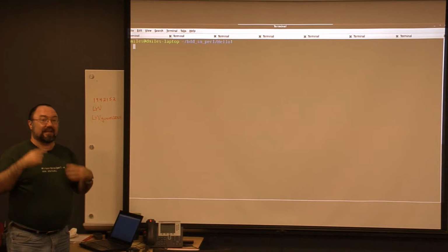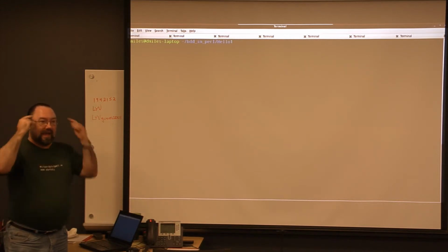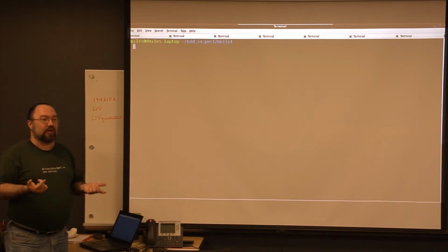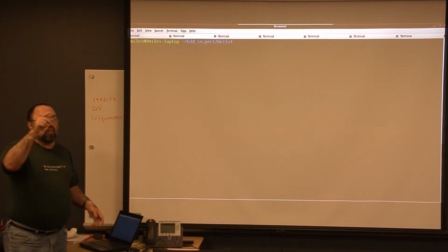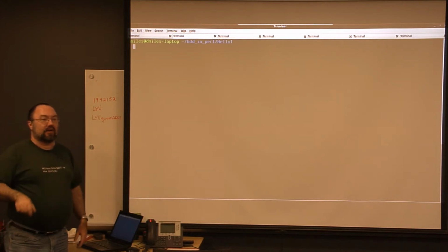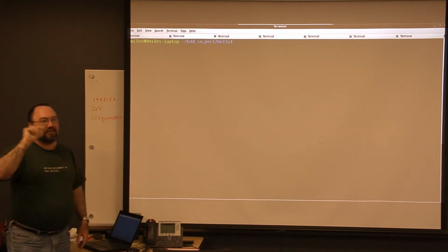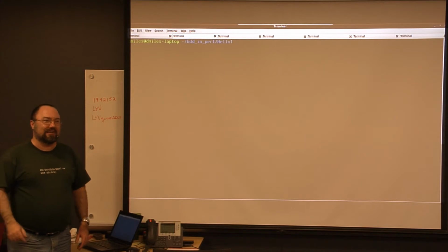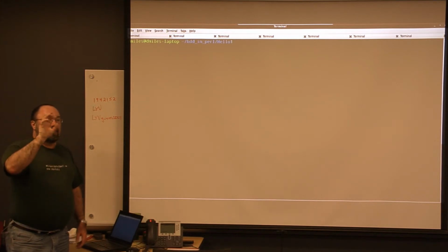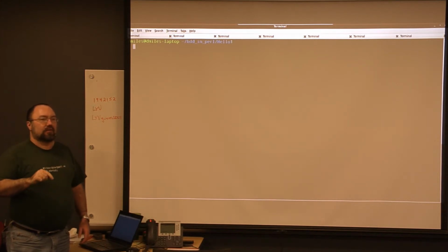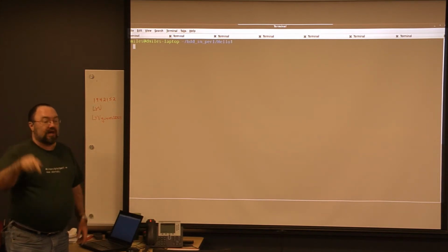And the developer said, this is what we think we can do. And in our minds, we have to take into account stuff like that. We may actually weight a story a little higher because we know in that section of the code, there's refactoring we need to do. It's starting to get a little messy. We want to clean it up a little bit. So we'll say, yeah, that's going to take us a little more than what you thought.